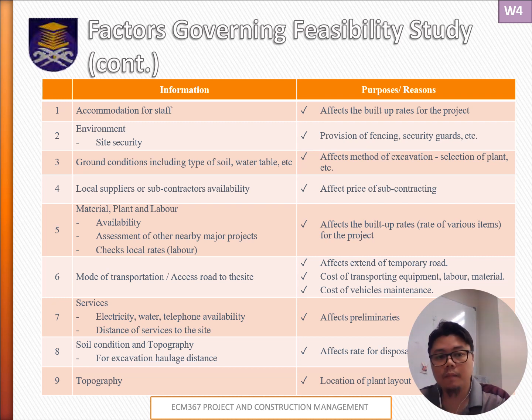Okay, so this is a summary. Firstly, ensuring our workers have proper accommodation is crucial in our construction projects, especially in remote areas where it is hard to find rental options. Otherwise, we might have to build temporary housing right on the site.